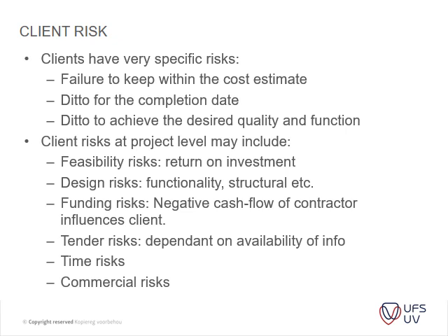It's embroidered on page 122 to 123, but basically you have feasibility risks, return on investments. You have design risks, like for instance your functionality, structural, etc. Then your funding risks, negative cash flows of contractors does influence the client. Then you have tender risk, depending on availability of information. Then obviously you have time risks, and then you have commercial risks as well.